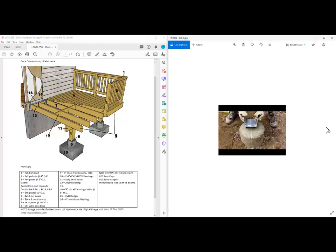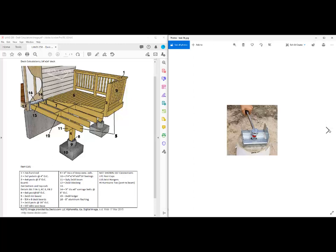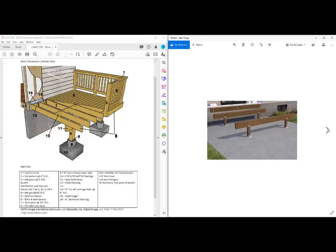Once we have poured the concrete posts, we set the saddle supports. This is what will support the posts that go above it. Setting the saddles is task number nine for us. There's different types of saddles. This one is an offset saddle with a one-inch gap. What that allows is that any water that comes down the actual post will drain off without sitting at the bottom of the post and potentially rotting the post. They're tightly secured into the support. You can see the offset distance and the gap in there, nicely set into the center of the column. You can also use a saddle that just has a rebar at the base. What's important is that we set these things at the right heights so that when we install the posts on top of them, they're nice, level, even right into the center of the sonotube.